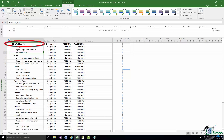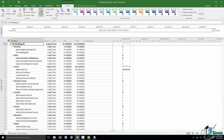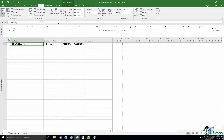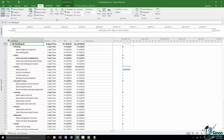The Project Summary Task's name defaults to the file name — in this case SSI Wedding 02 — and its duration reflects the total duration of the project. It has many important uses we'll explore during the course. You can select it and use Hide Subtasks to collapse the entire project down to just that single row. I'll leave the additional subtasks of Select and Order Wedding Dress in for now as they may be useful later. That's it on Summary Tasks and Outlining — please join me for Exercise 2.